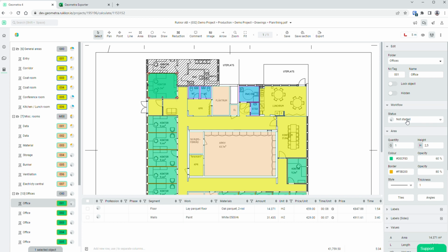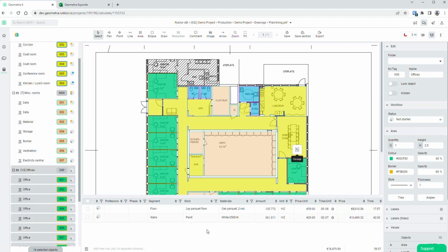So if you want the cost estimators to just have all of the power and the control of what we place in the estimate, you can then set project managers as viewers and they could just go in and update the status and use that to track the progress. They can also use subsets of data in exports to maybe know how much materials they need to order.